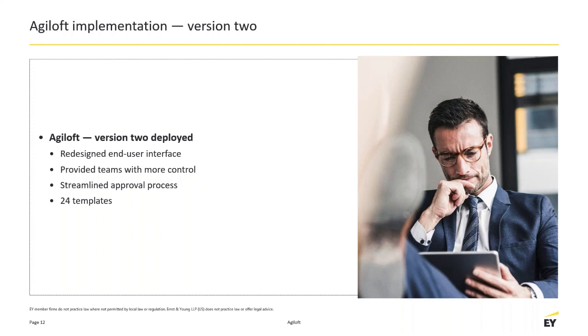When we originally went live, we only had 2 of our contract templates available for people. With this go live, we had 24 templates now available, so that we were really giving people a lot of options. And so when we went live in September, with our breath held on how this was going to work out, we knew maybe contracting season was going to start in September, although I was a little unsure of that. A lot of that was based on anecdotal evidence, and that was one of the things that tripped us up in our first implementation: we designed a lot of it based on people's anecdotes, based on the worst contracting situation they ever had, instead of their day-to-day contracting situation.